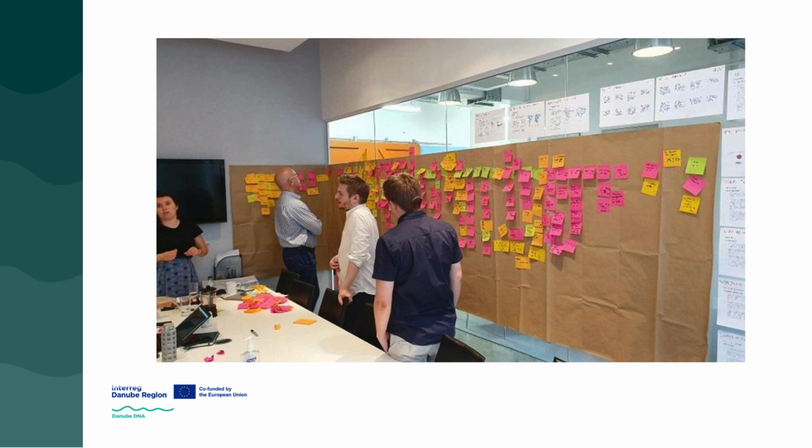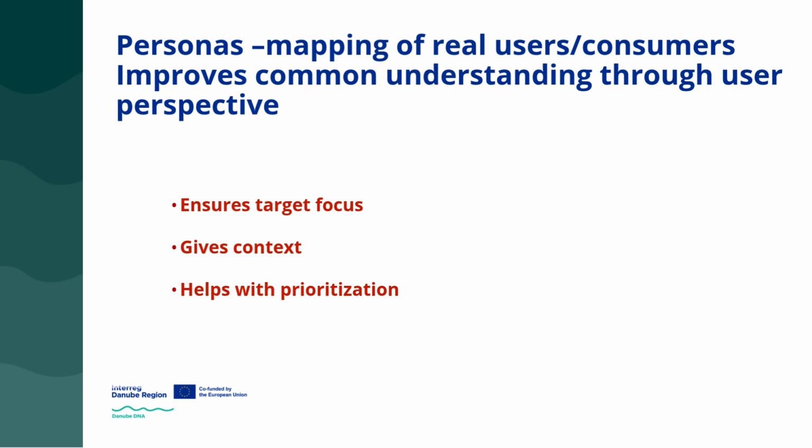The user story map stuck on the wall should literally be imagined as different colored post-it notes with different short sentences or keywords written on them. And the entire development team discusses next to it what they will be working on in the next period or what the given project is about. And from here, they usually select which user stories they will attempt to implement in the next phase, in that 2-week period when they will actively work on something.